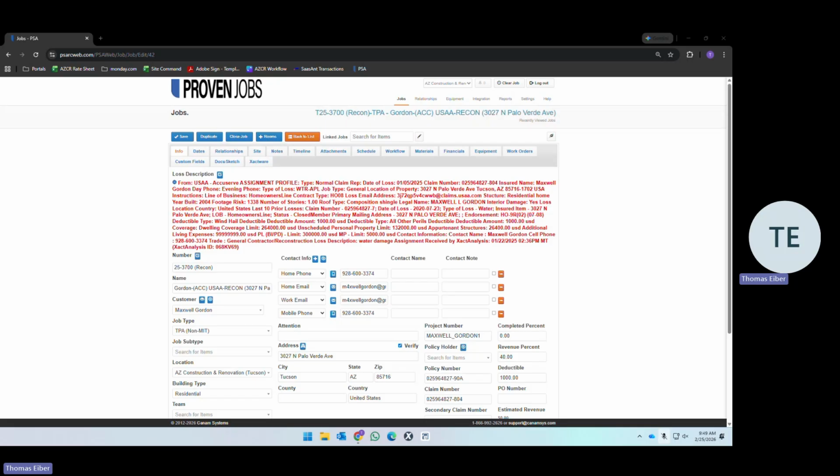The primary focus of an operations manager is production, as soon as ATP, or authorization to proceed, is provided. Once the job enters operational, find a project manager and schedule them for the pre-con walk to start the process of production. You handle the job from ATP to PCN, which stands for Project Completion Notice, the last notification out that a job has been completed, that we are no longer working on site, there are no issues with the client, the job is completed.